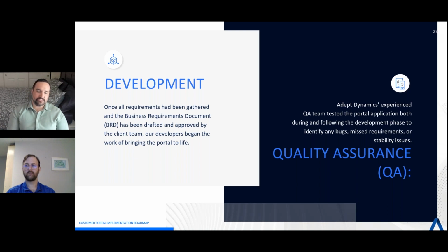And so what we'll usually do is, coming out of requirements gathering, we were hired for a scope for a very specific use case, and we'll go in with a BRD to development to meet that use case. But it's not unprecedented for us to leave with a business requirements document on what we're about to develop, plus a scope of work that's already drafted for version 1.1. Yes, those are all good ideas. It is more than you wanted.